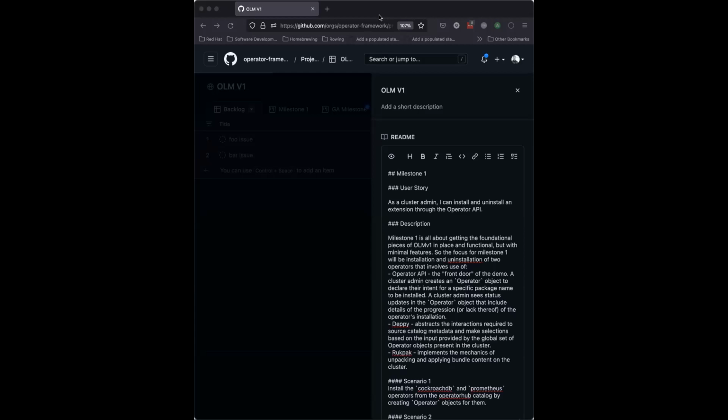I can imagine halfway through milestone 1, what we think we're going to do in milestone 2 is one thing, but as we get to the end of milestone 1, we're like, well, we really need to address this thing, so we're going to do something different for milestone 2, and now that item doesn't make sense. So I think creating a top level ticket to take proposals, or even just a discussion, right? A GitHub discussion is a good opportunity too, to allow people to give feedback on what they think should be completed in the next milestone.